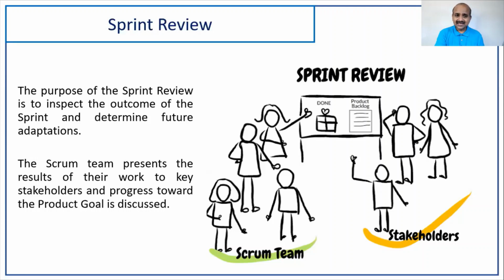Whether the test data is proper or not, number one. Number two, whether the definition of done is properly met or not. Number three is whether we are inviting the proper stakeholders to this. Are they coming? If they are not coming, then we need to inform them, like, can you prioritize other meetings so that you can actually come and grace your presence and provide your inputs on this.